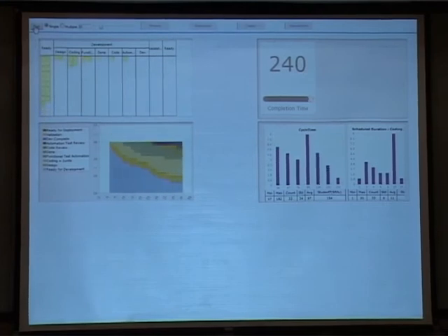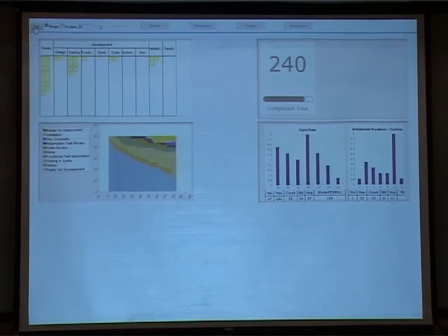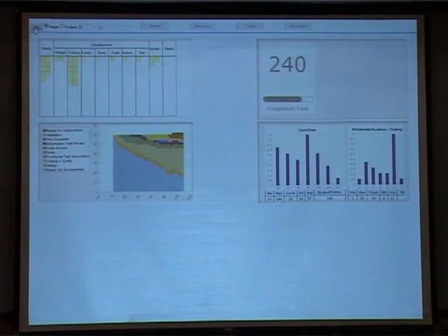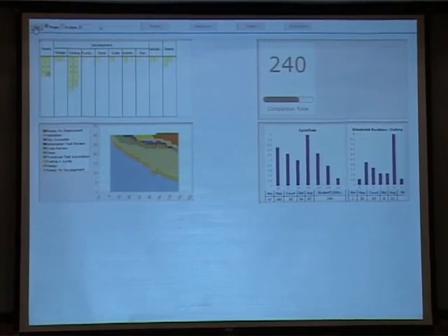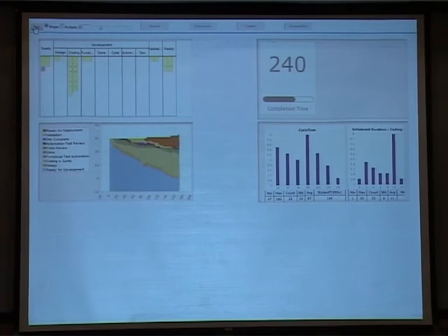And obviously now the cycle time, because it has the completion time, because now there is a certain level of defects that is being modeled into the board, it goes up from 215, I think it was last time, to roughly about 240 units. And as you can see, there is a red card that has been added there as things were getting tested. And obviously it's a simulation, so it's not necessarily that the 10% probability means it's always going to be 10%. It's a range that you're giving. But you get the message of what you're trying to do.